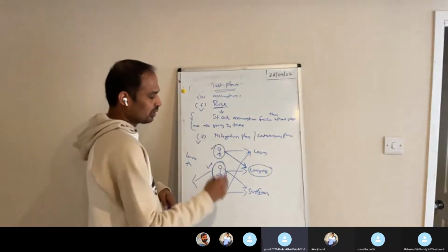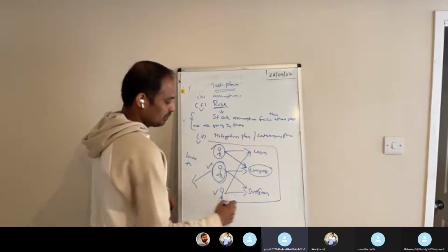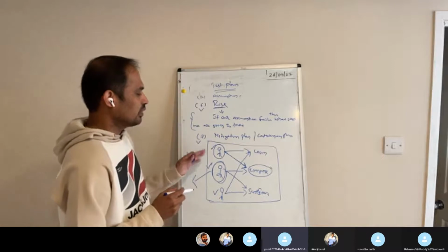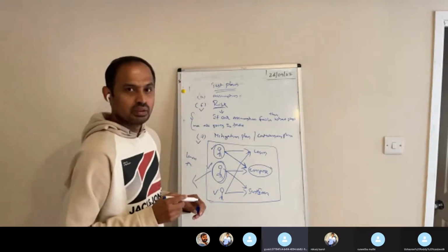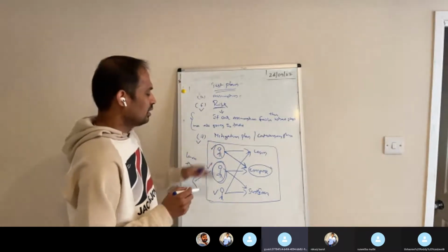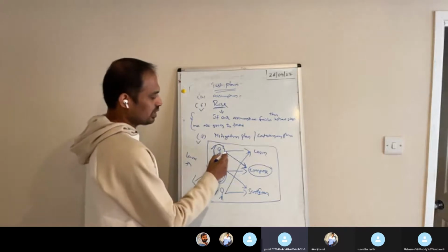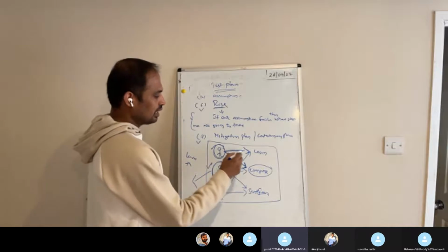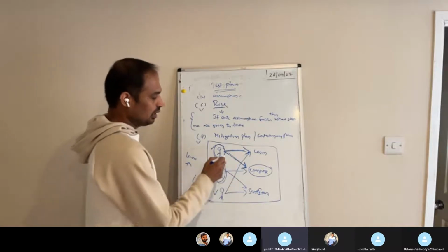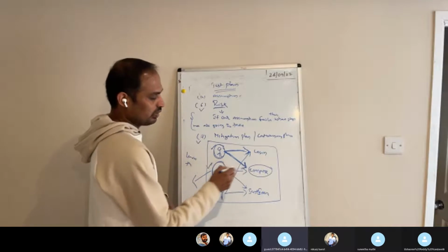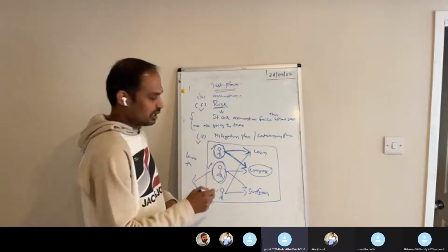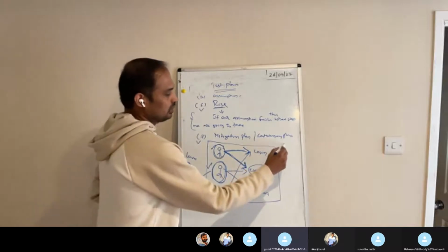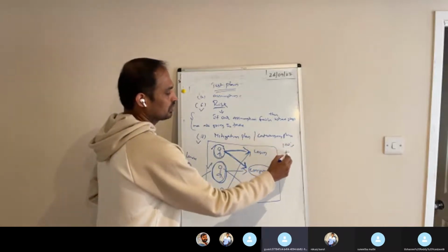Like this, we have a mitigation plan for every risk. We decide that the first resource must have knowledge of login functionality and compose mail. Though he concentrates on login, he will know compose mail, so we can reduce the risk if the second resource leaves the company from 100% to 20%.